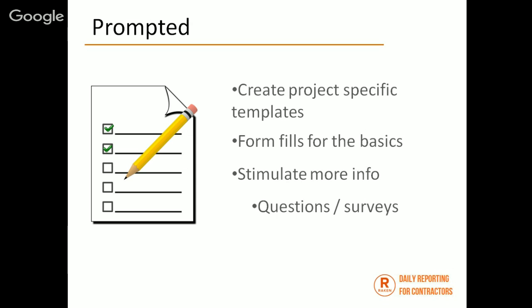Well, the forms were so small that they look great if you were doing them on a computer and you were able to type the information in, but they wanted people to handwrite these in the field, and all the blocks were too small to fit anything in. So what their complaint was to me was like, look at the reports we get from our subcontractors. We can't read them. We can't make sense of them. Our superintendents spend time every day going back and tracking all this. So basically all we did was revamp their forms into a more user-friendly system where they could be filled out better.